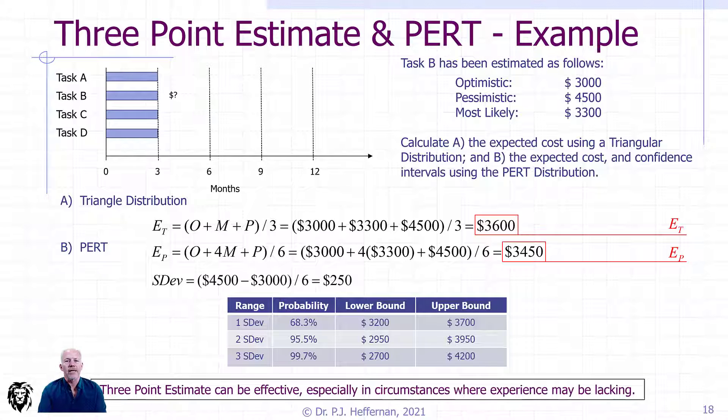Three-point estimates can be very effective, especially in circumstances where experience is lacking. They add to the conversation—remember they have to be realistic, optimistic, and pessimistic outcomes. To include this in your spreadsheet, in your work breakdown structure, it's a couple more columns. It's a conversation which probably should be happening.